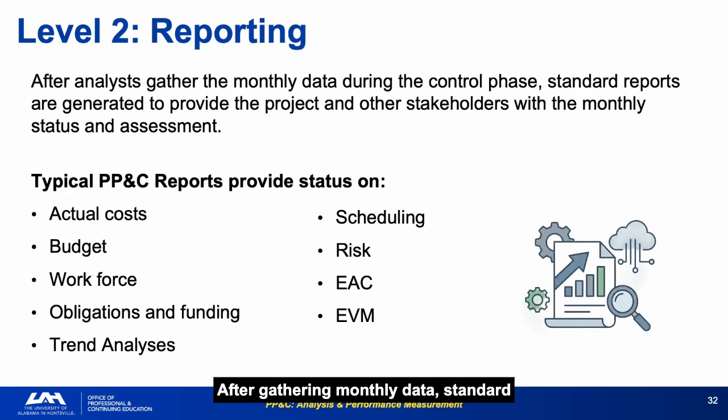After gathering monthly data, standard reports are generated covering actual costs, budget, workforce, obligations, trends, scheduling, risk, EAC, and EVM. Reporting is a delivery mechanism, not an end in itself. The reports exist to communicate status. They succeed only if the recipient understands the status.